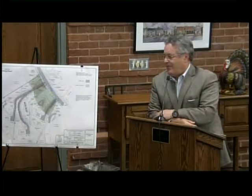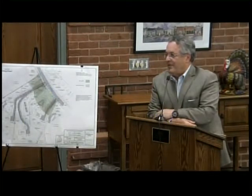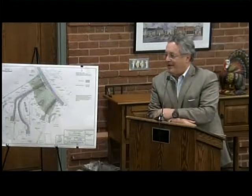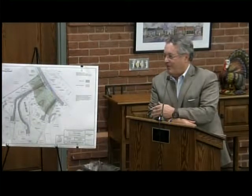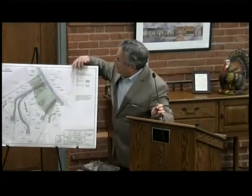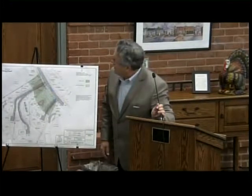It's a very steep property, so you just can't get in there without having to cut some slopes on the sides. We did consider putting in walls, but one of the issues is, if it is supposed to be a wildlife area, putting walls on the driveway doesn't help that concern. So it's better that it's sloped. So when we got done with that, we wind up with the disturbed riverfront area almost 19,000 square feet, which is pretty substantial.